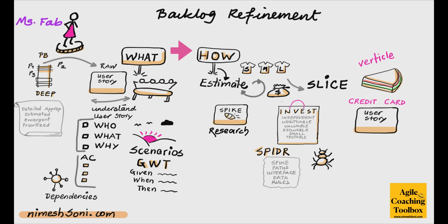So we are talking about it, we discuss it, and we identify that, hey, 3 slices of this could be that we focus on the US market, then we will focus on the Europe market, and then we focus on the Asian market, because each market has different needs, different logistical requirements, and things like that. So we will focus on functionality related to just the US market first.